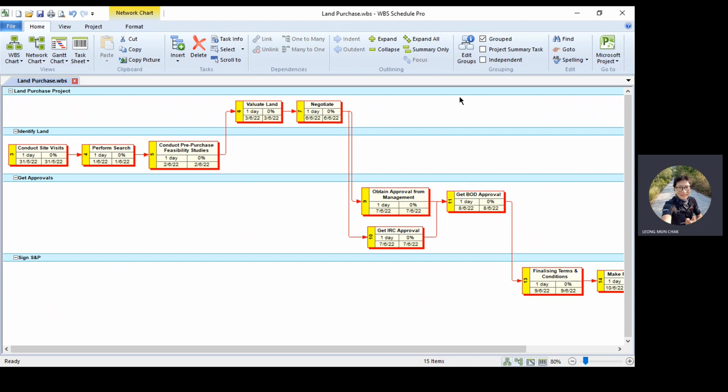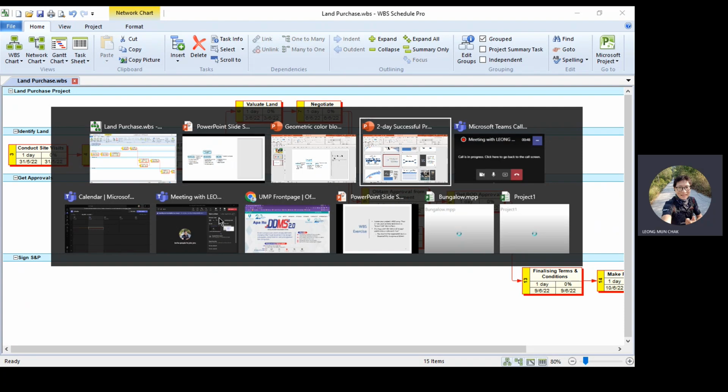If I were to proceed from this recording and show about the activity duration and so on, I need to know the resources. If I don't know the resources, there's no way for me to estimate the duration. It's only as good as saying, oh, okay, this is how it flows, but how long does it take? I do not know. Okay. So let me save it and I will pause my recording.